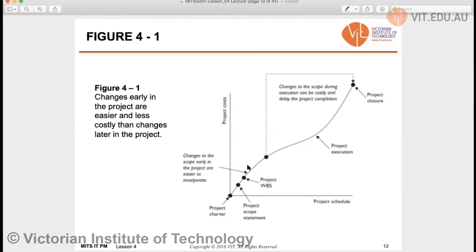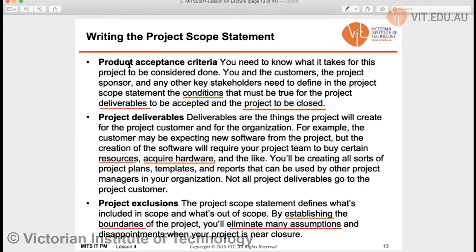If you make changes early it should be cost effective, because you are not going to close the project yet. If you have to change things late, you have to redo a lot of work before you can close the project. In summary, it is better that you fix your errors in the initial stage of the project. After the product scope statement, we need product acceptance criteria.